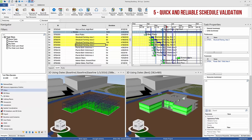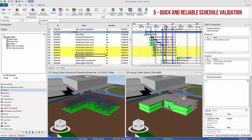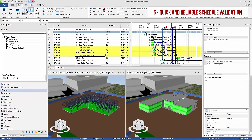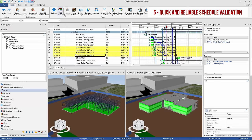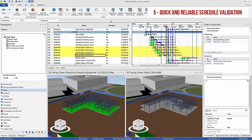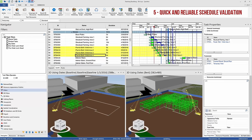And then because of shortage of welders for example, we can link all the welding activities as finished to start and bring in only one crew and see how that would affect the schedule.